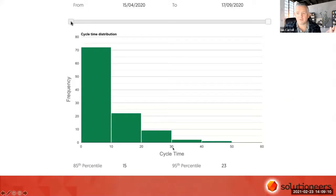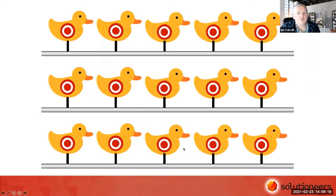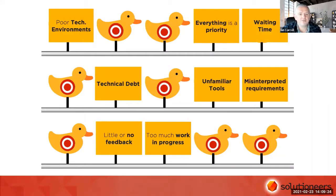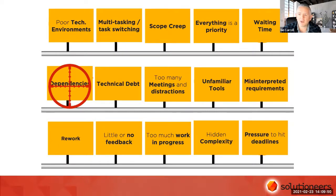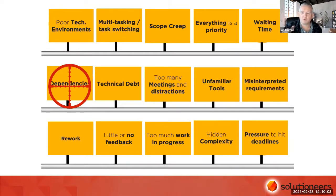This is a great exercise for retrospectives — start to attack your sources of variation. Common sources include poor technical environments, technical debt, unfamiliar tools, waiting time around the board, and too much work in progress — trying to do too much at once, where everything's a priority. There's a whole bunch of things that could affect the team's ability to be predictable. In today's talk, we're really going to focus on dependencies — when we have to hand off to other teams. Dependencies will create less predictable outcomes.